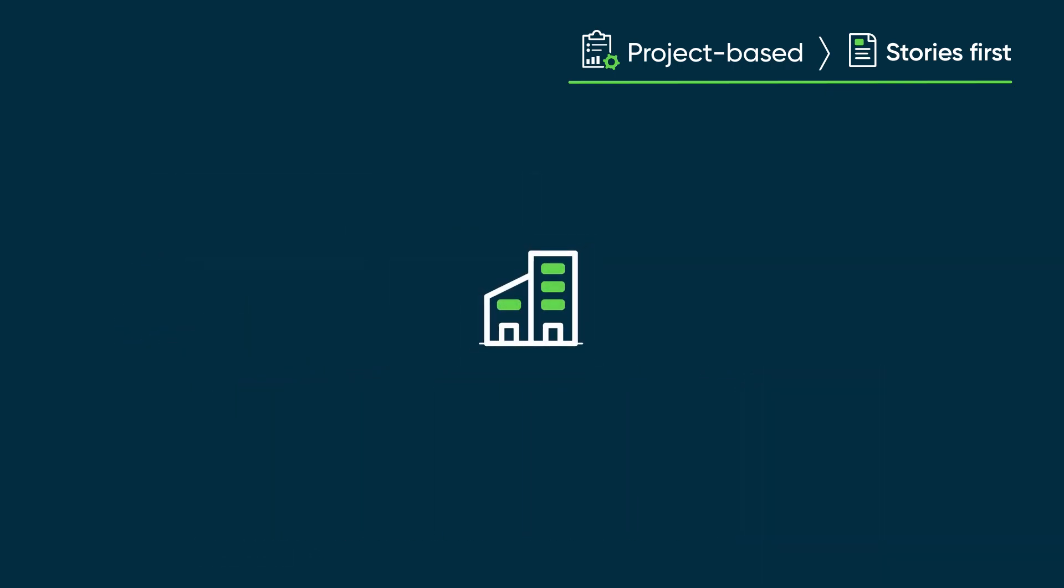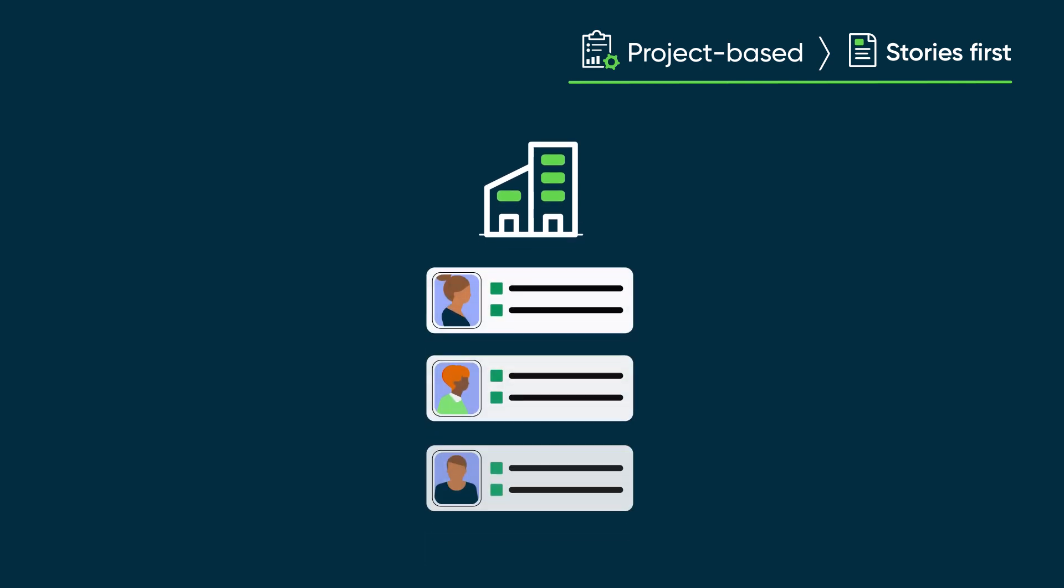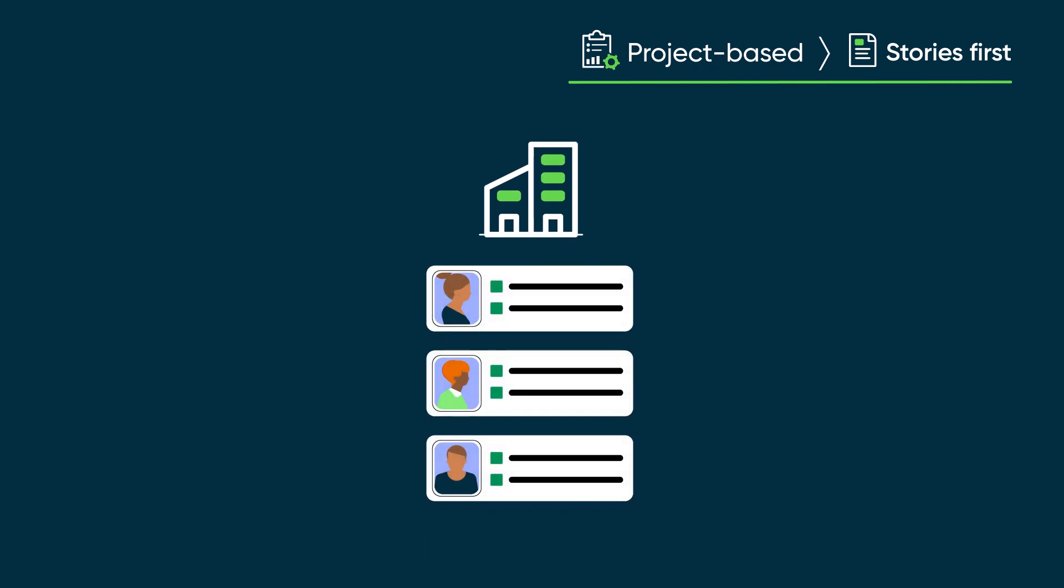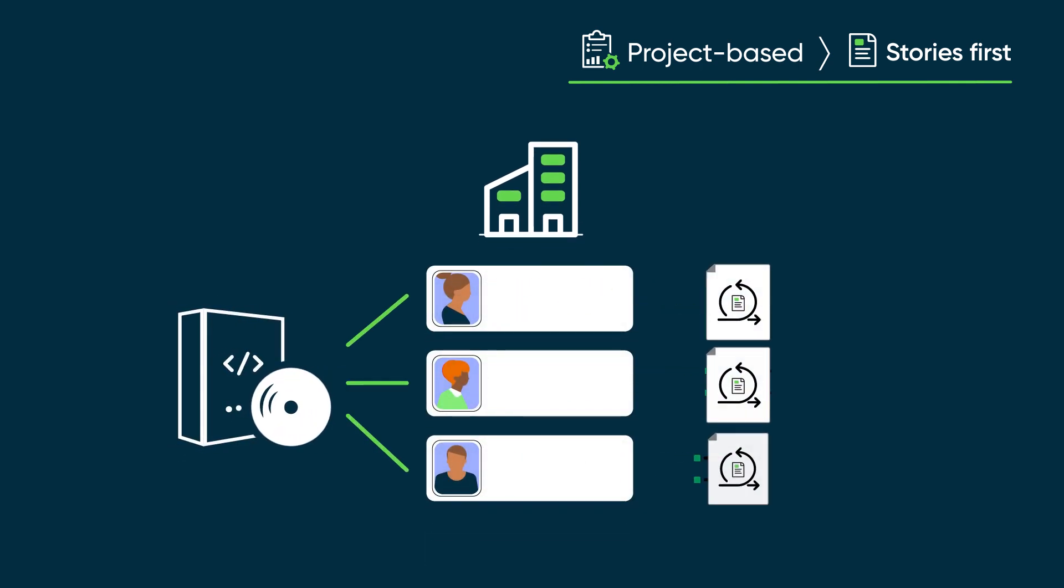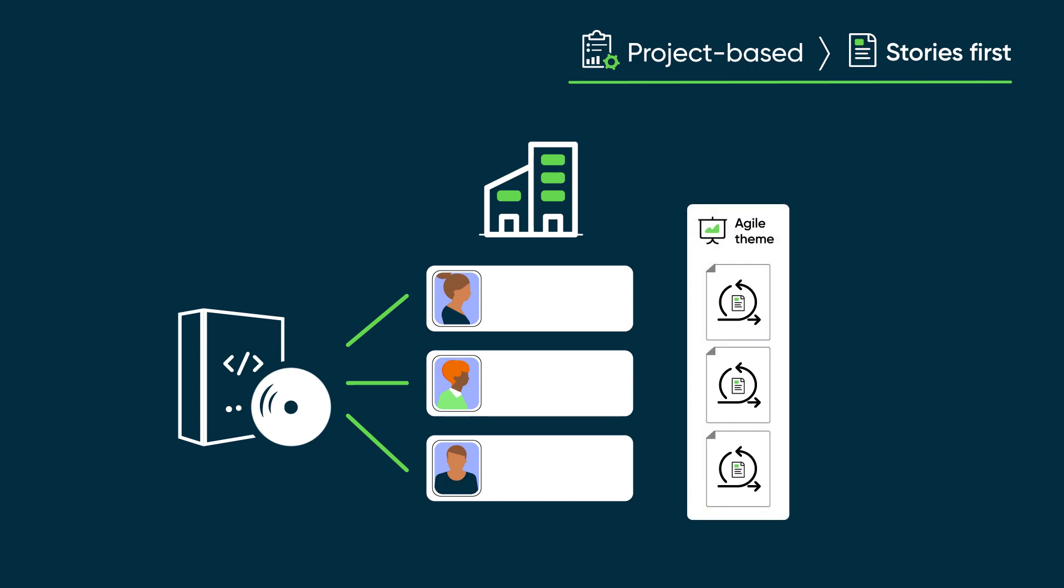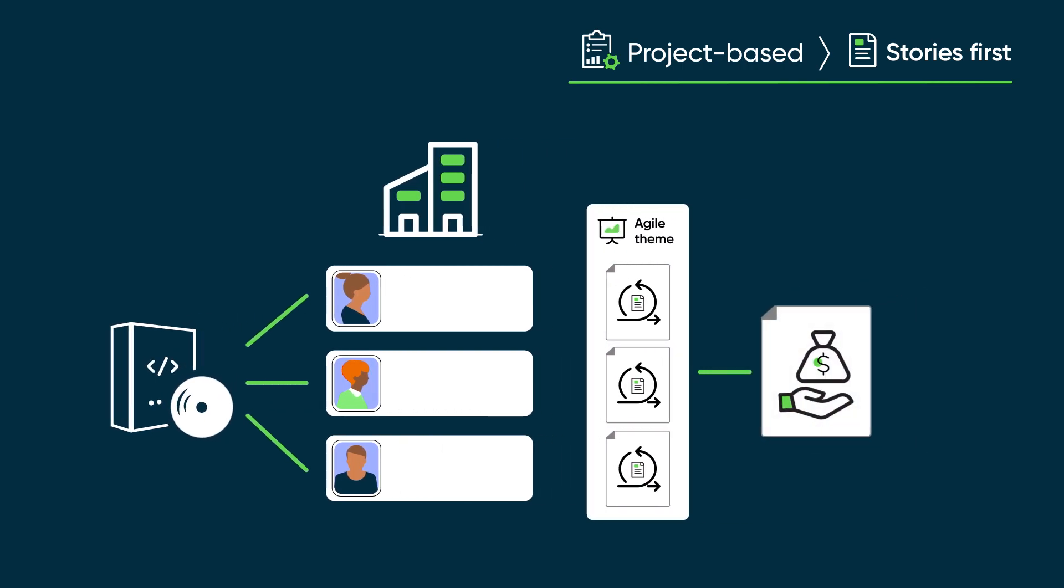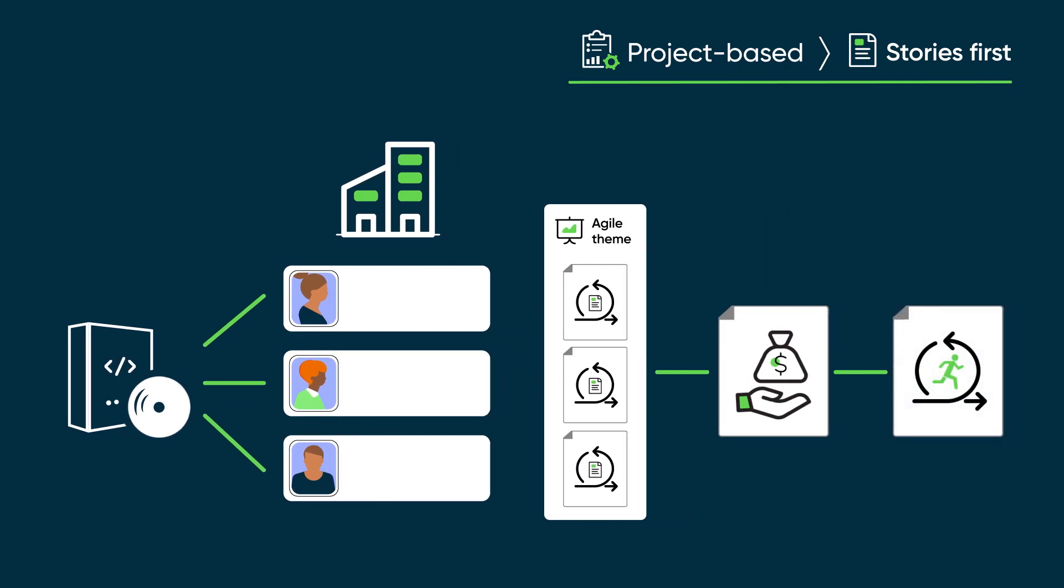For example, a company might collect requests from customers for enhancements to a software product, create an Agile story for each request, combine a set of related stories in an Agile theme, create and fund a project to execute the theme, and finally, implement the stories in the theme using Scrum methods.